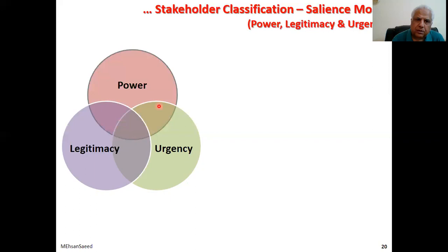This stakeholder or these stakeholders have power as well as urgency. And if it is negative power, this lot will be a very dangerous type of stakeholders. Of particular concern are these types of stakeholders who have legitimacy, that means they have legitimate power and interest in the project, and they are always seeking information. Why are they important? Because on gaining a bit of power, where will they promote themselves? Into this, where they will enjoy all three things: legitimacy, urgency, and power.